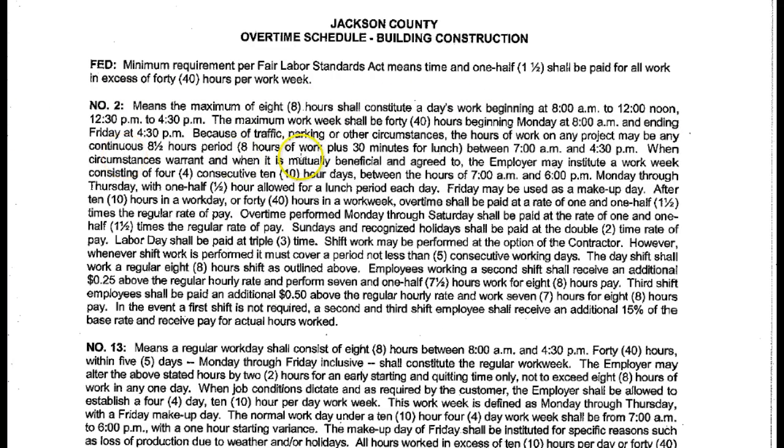It describes things like how you count the hours, when the hours start and stop, what days of the week they count for. It tells you when overtime comes. And for example, if you look here, it says Labor Day. If you work on Labor Day, that's that first Monday in September, Labor Day shall be paid at triple time for any of those classifications that are number 2 for overtime.